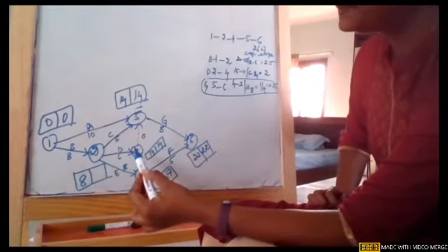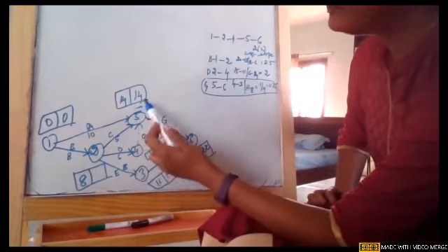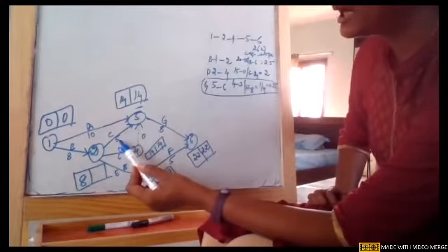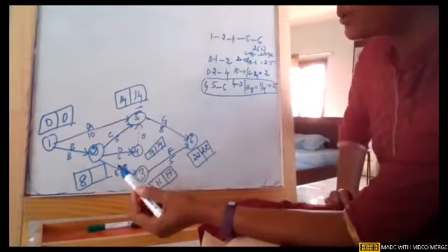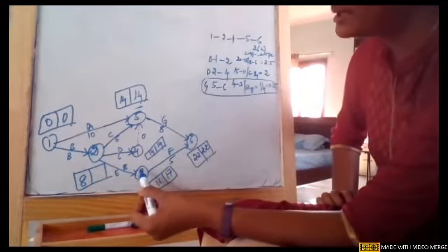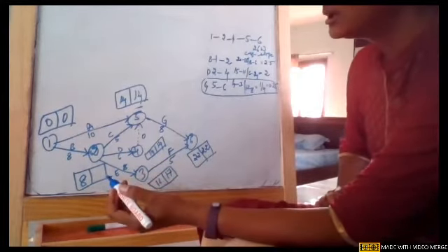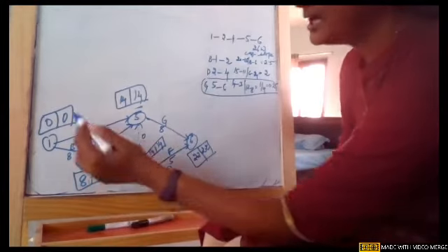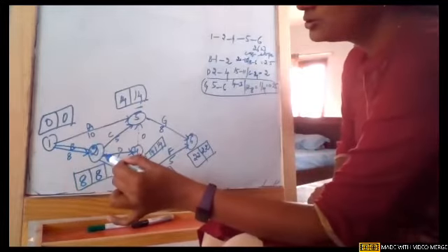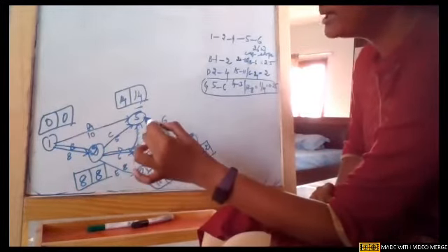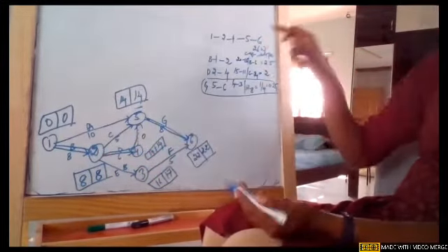Near node 2, we'll see 3 tails are there. One is giving 14 minus 5, which is 9. One tail is giving 14 minus 6, which is 8. One tail is giving 17 minus 8, so it is 9, I think. So obviously the lowest value is 8 and 0. So again, this is how we got it. It is 1 to 2, 2 to 4, 4 to 5, and 5 to 6. This is again our same critical path, 1 to 2 to 4 to 5 to 6.